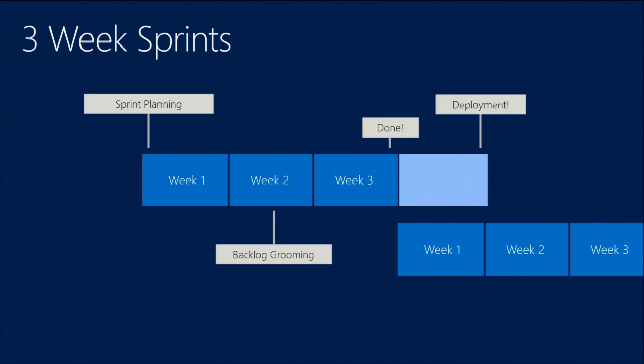And the thing is, I don't know how you can get people excited about doing a feature, getting them revved up to do something when they're seeing it for the first time on the same day that they're being asked to estimate it. So one of the things that we did is a lot of teams are implementing these weekly grooming meetings where it's just an hour, it's on the calendar, everyone comes together, and the product owner says, hey, this is the stuff that's coming up in the next sprint. And they walk them through the stories. There might be storyboards that they're walking through, and that gets people starting to think about it.